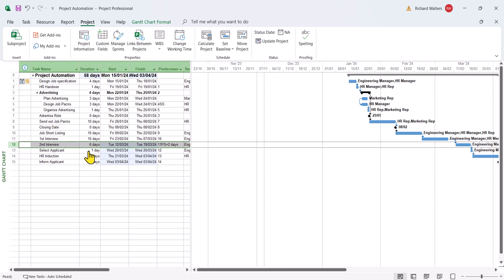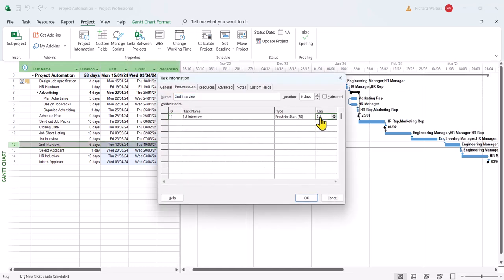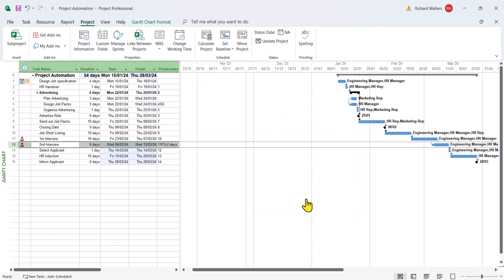We'll apply the same method now for a lead to pull ahead. Minus two this time. Click OK. And there's gone to 54 days. It's taking two days off.